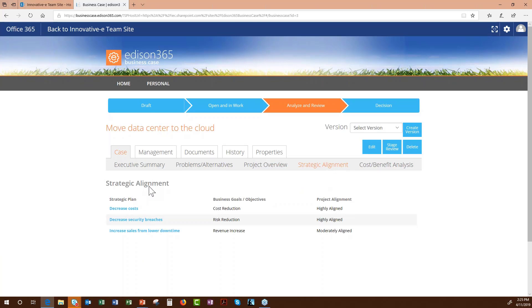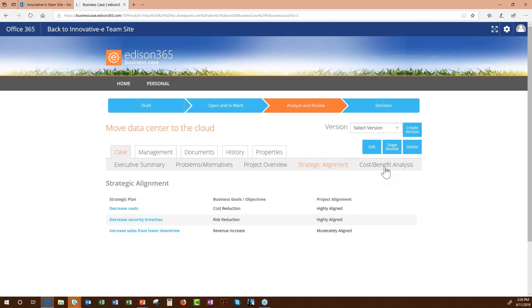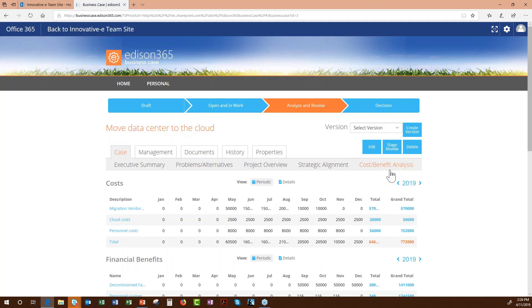The strategic alignment tab is simple but powerful. It maps your business case to organizational strategic drivers — such as cost reduction, risk reduction, and revenue increase — and lets you rate alignment as 'highly aligned' or 'moderately aligned.' This is important for executives ranking initiatives when there's only so much money and resources to go around.